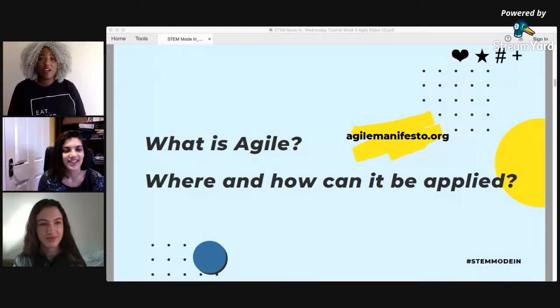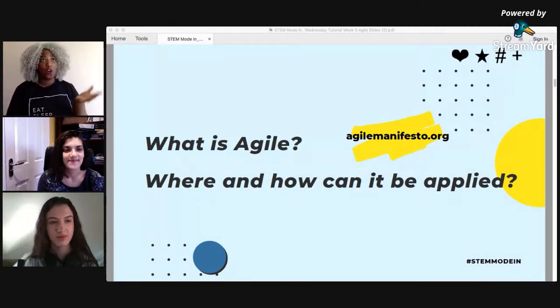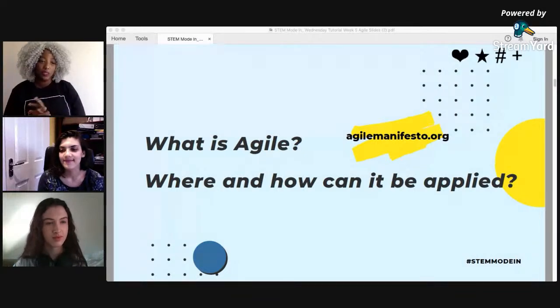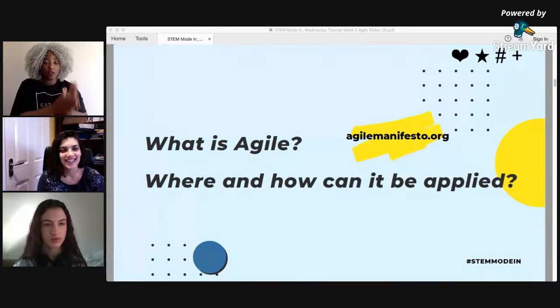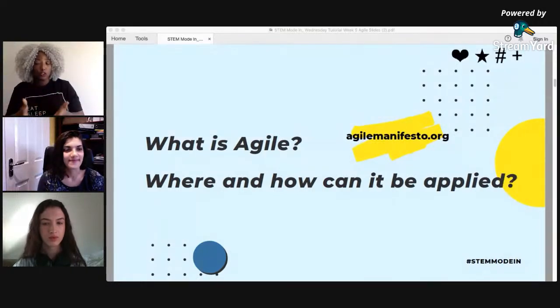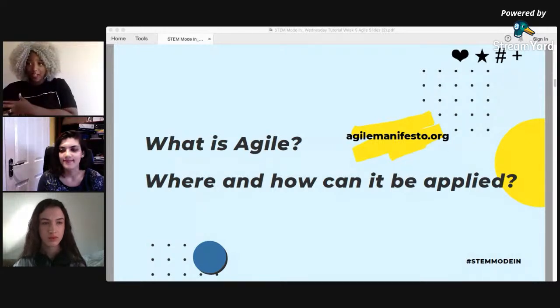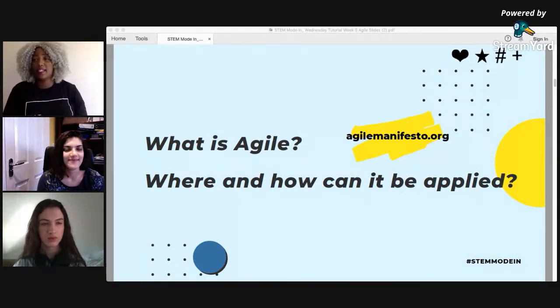Pretty much it, yes. So Agile is, some would say, the opposite or the new version of what we call waterfall. In the olden days, when you were starting a project, you might do analysis of the issue you're trying to deal with and why you need the project. You might then design what you're going to create. You then go to implementation when you make it, you test, and then you evaluate, but you do all of that once. It's a little bit like planning to build a house: you sit down at the beginning and say exactly what you need, you lay out your budget, you lay out your designs, you start building, then you test, and then you evaluate.